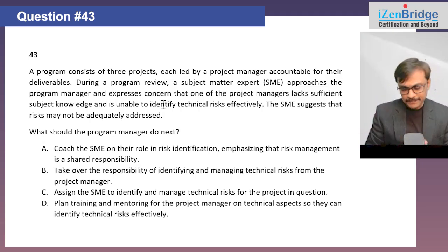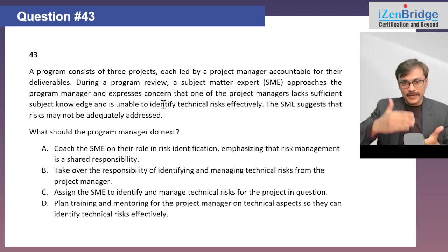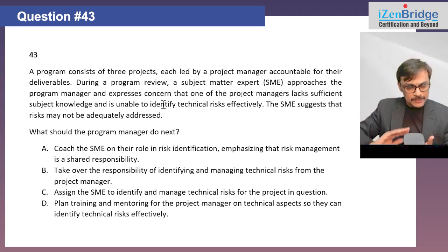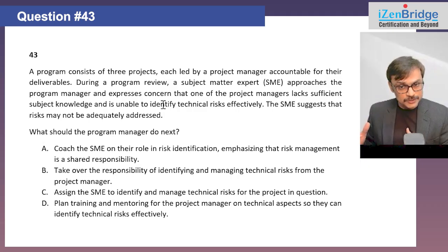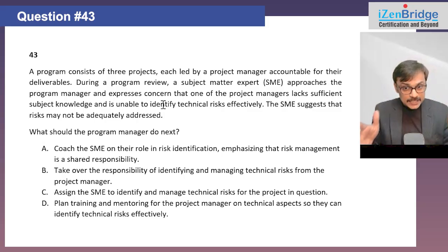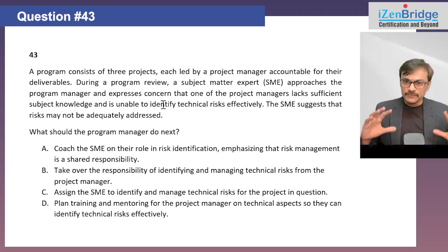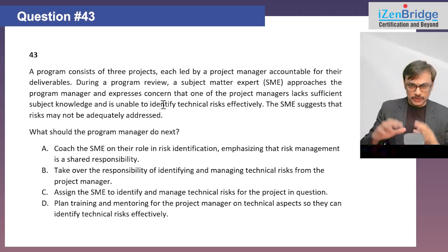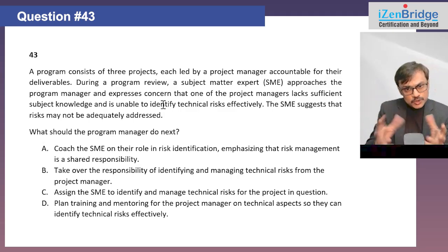Why? Say you are talking to someone, and we want to reiterate for the PgMP exam that identification of risk is the responsibility of everyone. Team members should do it, stakeholders should do it, subject matter experts should do it. I should talk to the stakeholder and acknowledge: thank you for really caring for this particular project, I appreciate you sharing the concern. At the same time, whatever risk you visualize as a technical expert, please report it. There is a process of reporting and putting them into a risk register, a mechanism for doing it. You don't have to wait for a project manager to do it. You should be able to do it too.